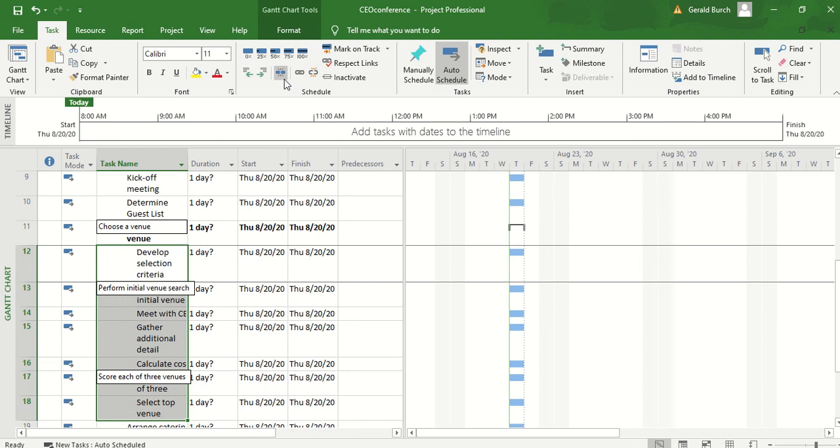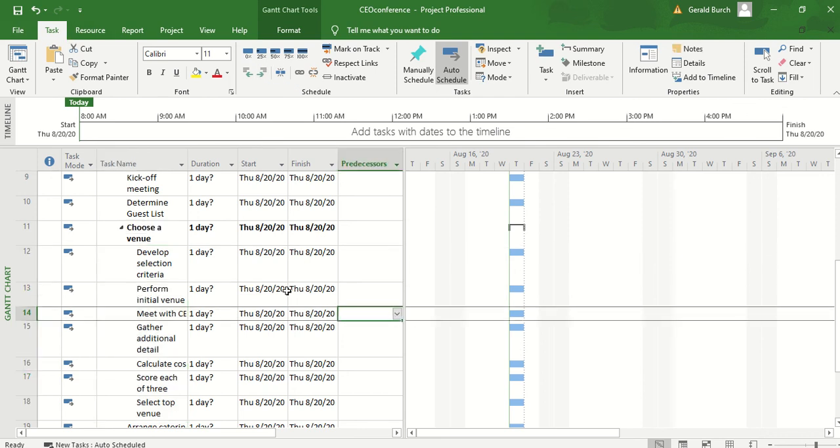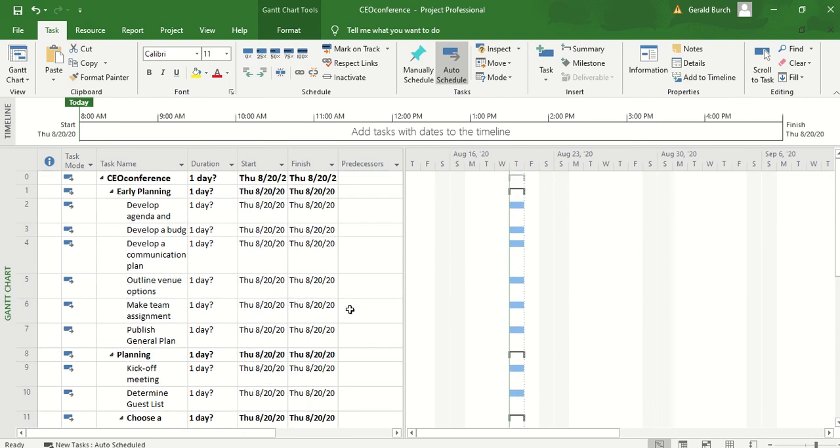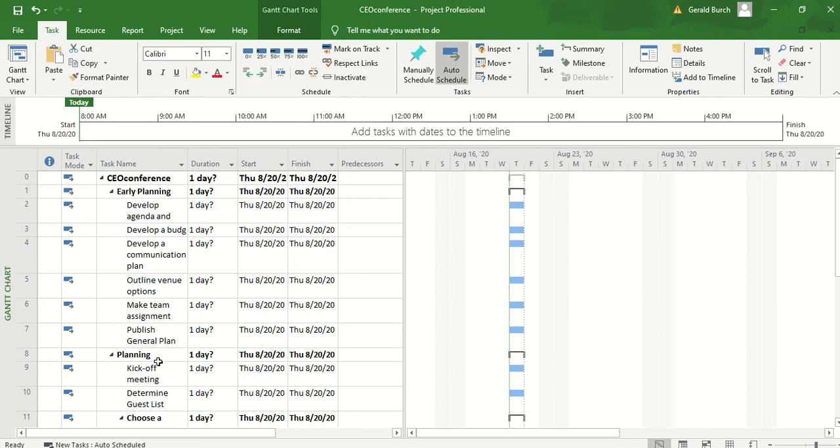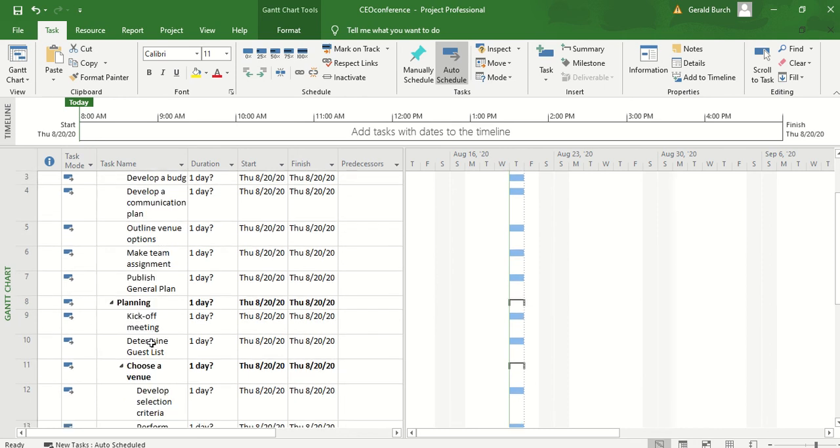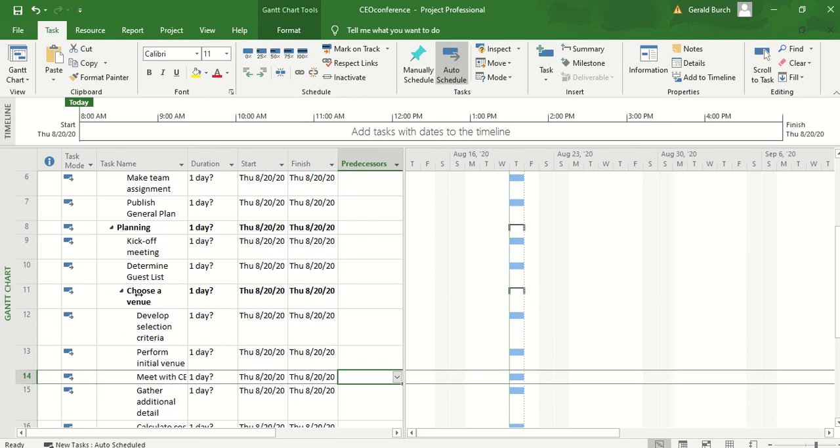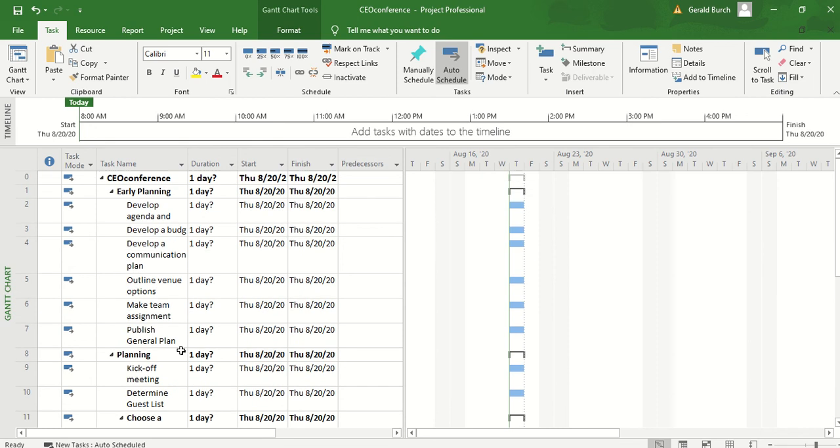Again that indent is under task and you can see right now we start to have a hierarchy that's developing. CEO conference is the top level. We have two first order tasks that are working on early planning and then also a regular planning subtasks associated with it and even some of our subtasks have subtasks associated with them.